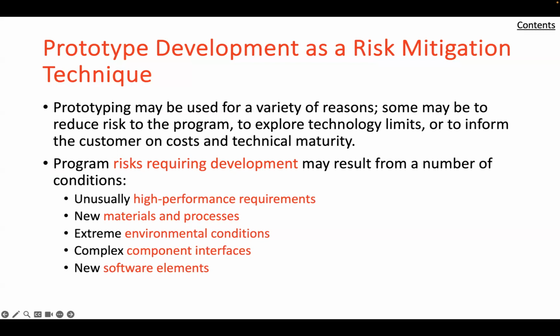During early risk management activities, a system engineering approach to the identification of potential problem areas is to take a skeptical attitude, especially to design proposals unsupported by relevant precedent or hard system engineering data. The system engineers ask, one, what things could go wrong? Two, how will they first manifest themselves? And three, what could then be done to make them right? So what are some of the potential problem areas?